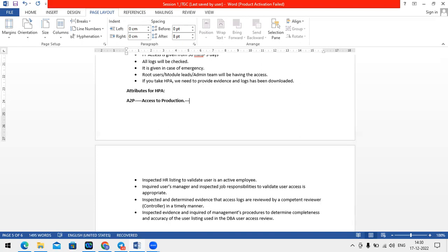So then they will review it and provide the approval, and on that particular date and time he will make those changes, and once the time is completed he will get out of that live environment. Then this particular team has to review the logs as well, to check whether he has touched server A only. If he requested server A, he has touched server A only. He has not touched any server which is not part of the change request.